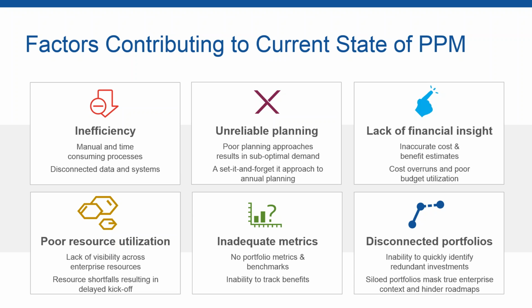Also, budget obviously is finite, so as cost overruns occur, which are just natural for projects, something has to give at the portfolio level, leading you to maybe de-scope, cut, or cancel projects that were planned for that year, again resulting in erosion of the planned business value from that portfolio.